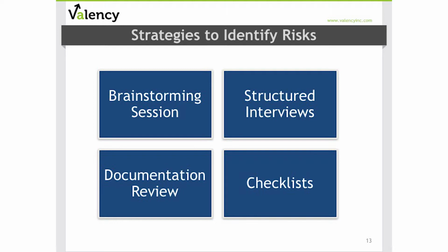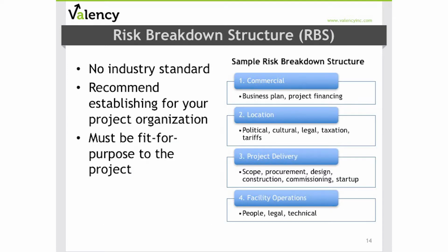And this year, my team here completed a review of all of those publications and developed a risk identification checklist that has over 150 of the most common risks in capital projects. And this is one of those key resources that if you don't have something to start with, it's a great place to start that you can then add additional information to.